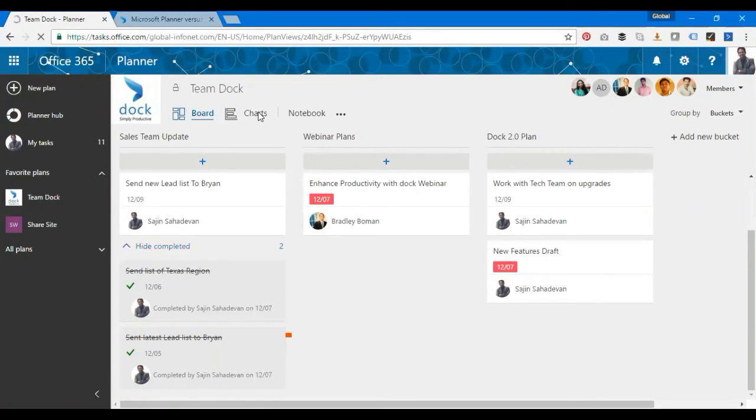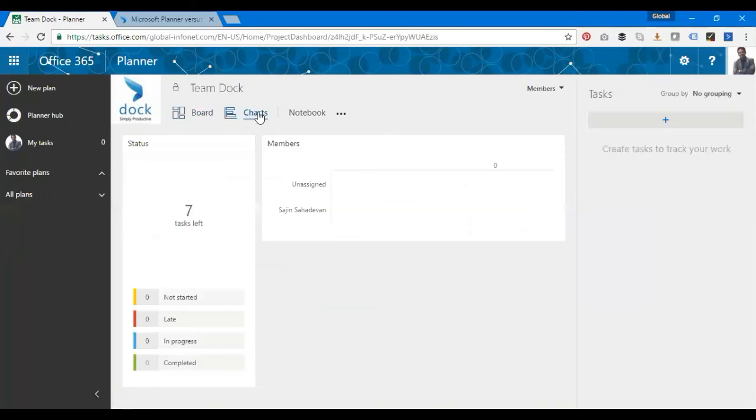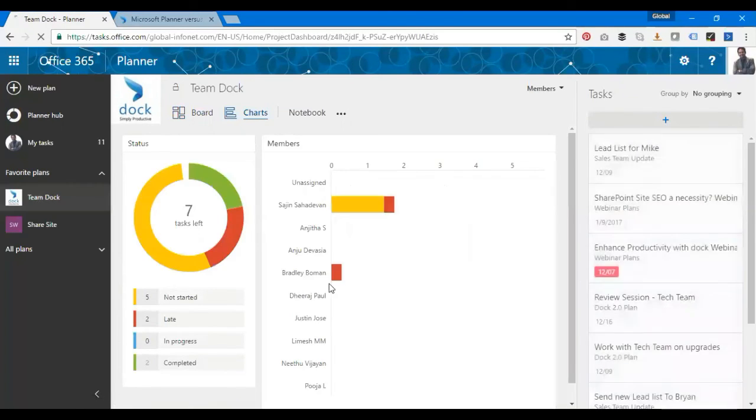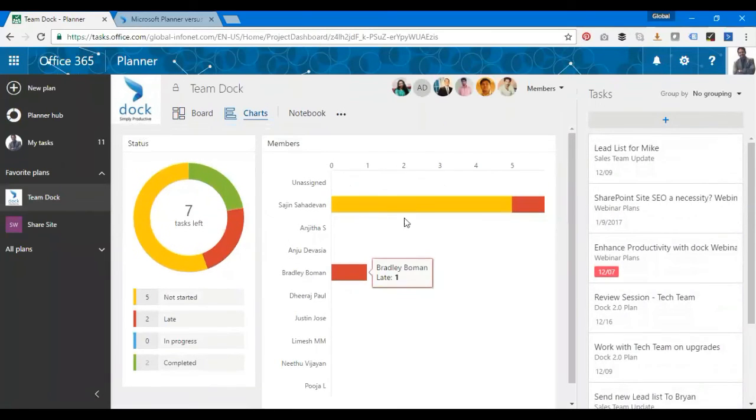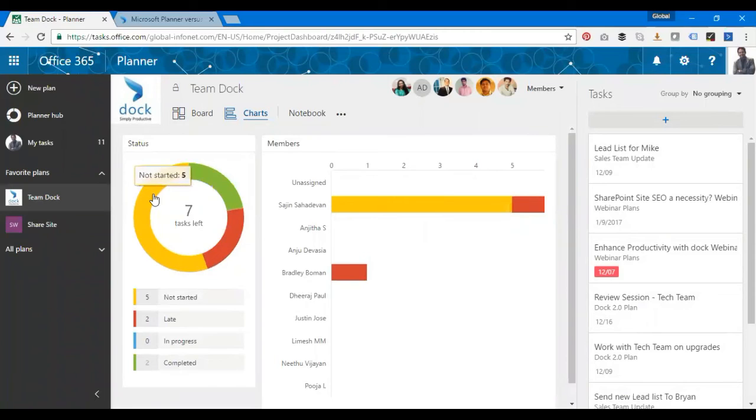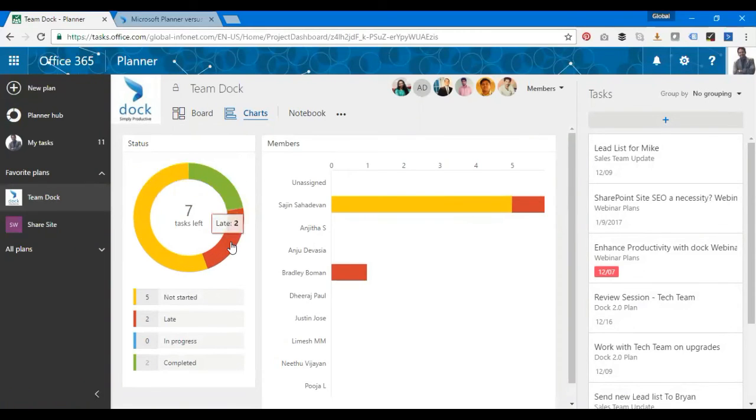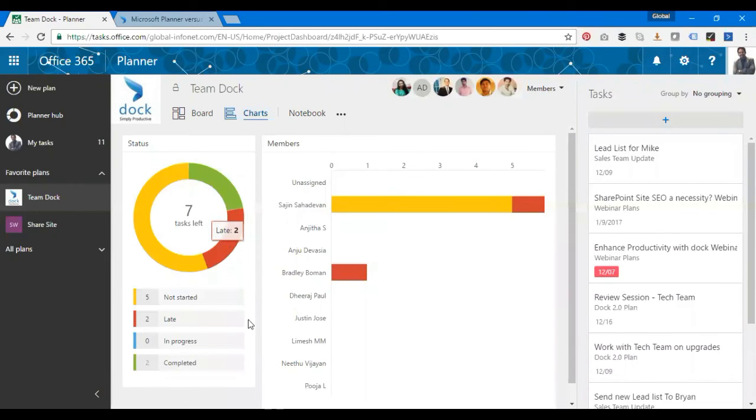I have the charts view. Click on Charts and it shows a visual chart of tasks and their progress. I have seven tasks left and one member assigned. Yellow shows Not Started, green is Completed, and two are late—I have to act quickly. Red shows zero, blue is In Progress.